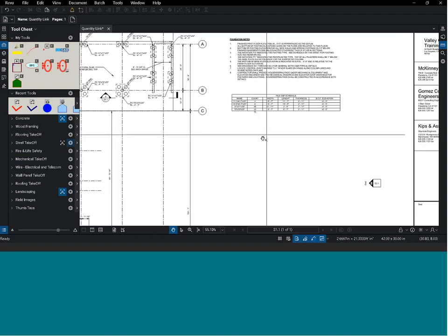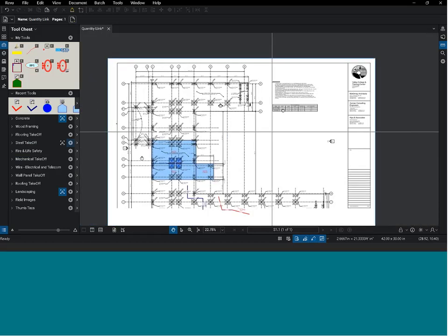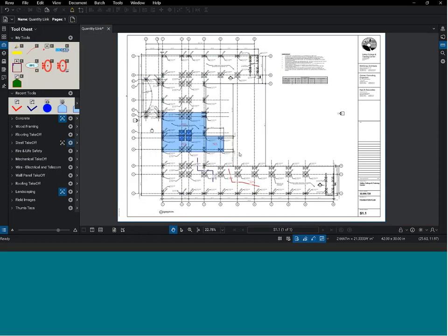So with these guys, we put their entire lumberyard in an Excel file, and we built tools for them. And now they know exactly where they are in their takeoffs. They're loading up the truck based on layer. I have these built so that only the basement layer can be turned on and printed, and now they have a drawing and load list for getting that out to the field. Much better quality. They're doing residential homes that used to take 3 hours. They're now taking 40 minutes, and there's a lot less reorder when you're figuring out what boards go where with your drawings there.